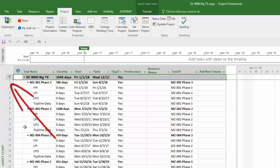If any of these level zero summary tasks match between your files, then you will need to change them to ensure that they're unique in order for this to work right.